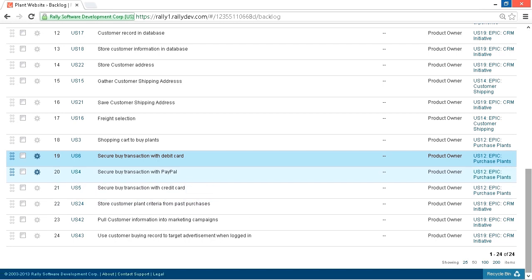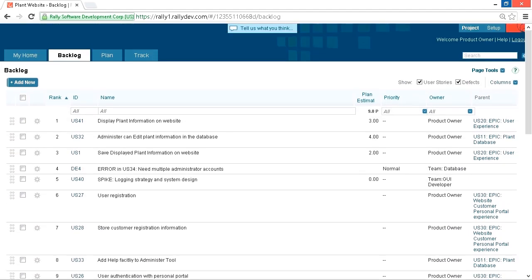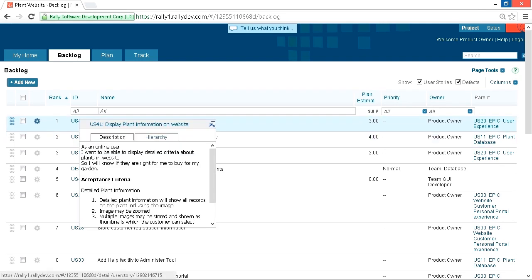However, when you go to the top of the backlog, these are the high priority items. These are the items that must be sprint ready, because the next sprint planning meeting, these items are going to be pulled, these high priority items, to go into the sprint backlog and be included in the next sprint. They have to be sized to fit into a single sprint with acceptance criteria clearly describing when the PBI is done. This sizing and adding of detail is done in the product grooming meeting. In the product grooming meeting, the Scrum members assess the high priority PBIs, grooming them to make them sprint ready.